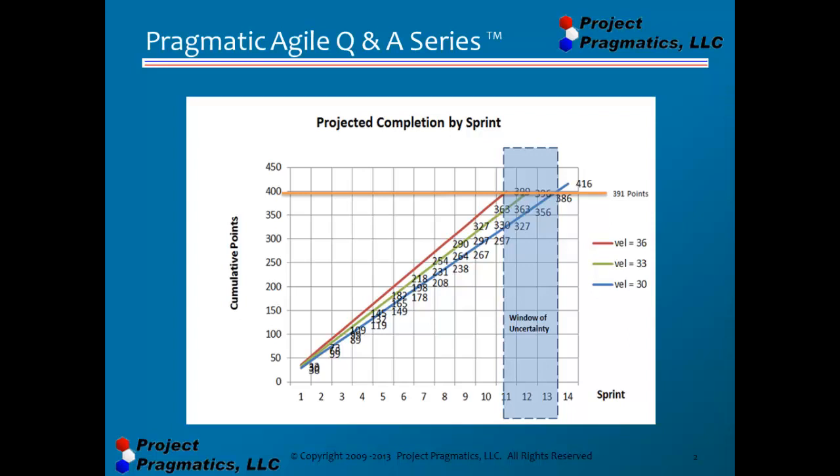All you have to do is plot out that line — 33 points per sprint — until you reach the maximum of 391 points. And that shows you that this project is projected to be done at sprint 12.